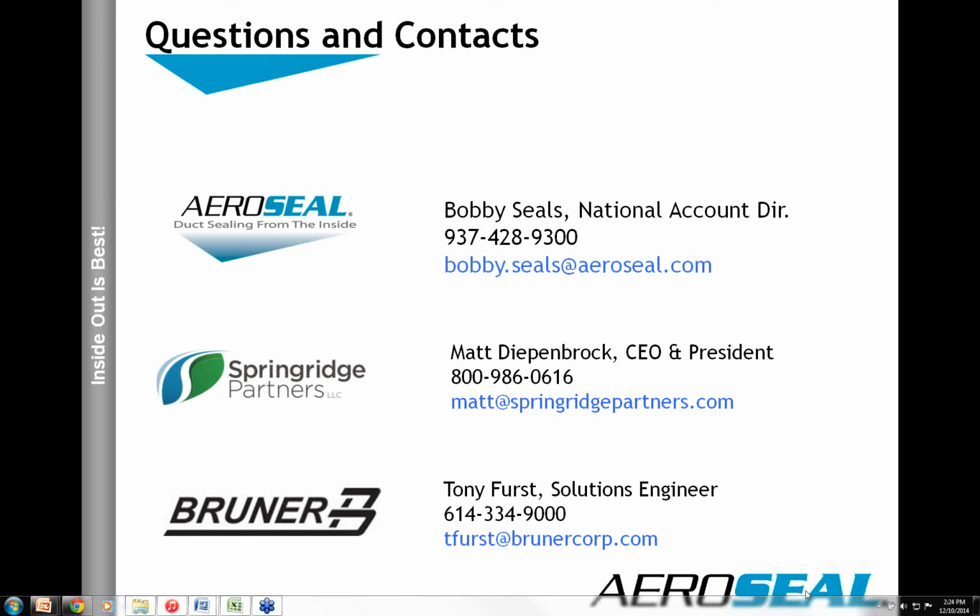Well, the checklist that we use on our projects, we have a master checklist we've developed, and we break it into pre-sealing, then the sealing event itself, and then post-sealing. Some of the pre-sealing checklist items are to make sure that you understand what the ductwork is, how it's actually built, not just how it's drawn on the drawings, and making sure that all the devices are blocked properly. Temperature control, smoke detectors, things like that are removed or bagged to make sure that they don't get filled up. Let's say VAV boxes, make sure those are blocked, coils are blocked, humidifiers, etc. So those are some of the pre-sealing events.